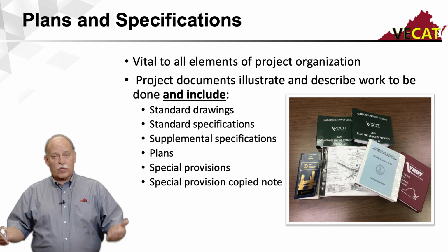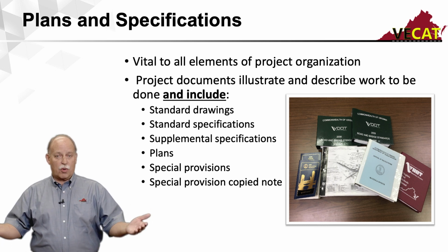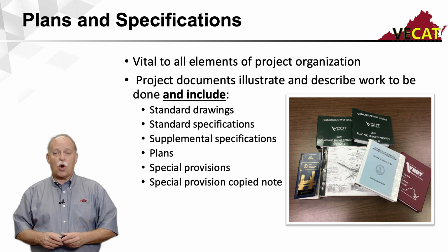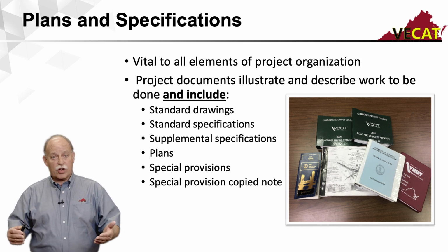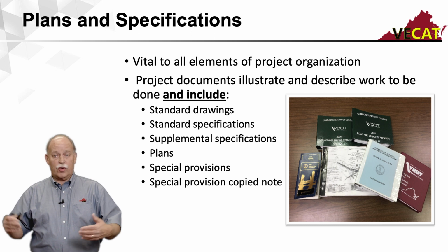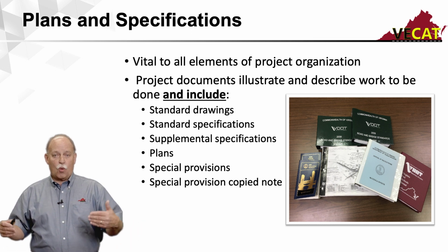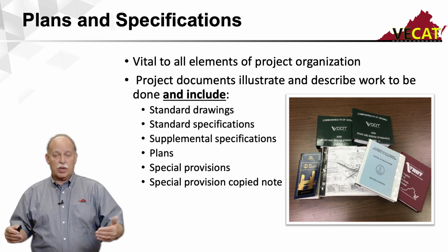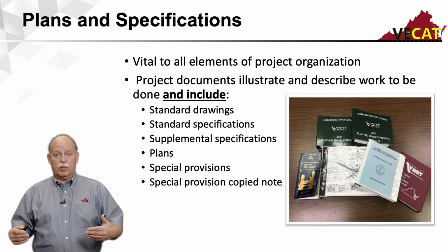From there, for that specific project or the other projects, there'll be something called special provisions. Those special provisions are specific to a project. Now, they may be carried over and be in multiple projects, but they're not standard. They're special provisions. So those special provisions are written for and to be utilized on specific projects, just like those plans were, and they'll be in a contract document.